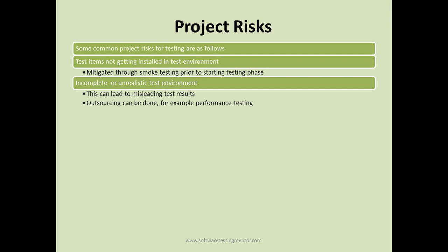For this, outsourcing can be done, for example, for performance testing. If you do not have in-house expertise for doing test environment setup for specialized testing like performance testing, this can be mitigated by outsourcing. So you can outsource performance testing of your application to another organization.